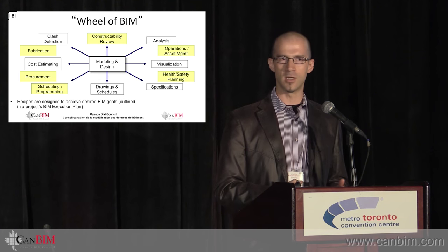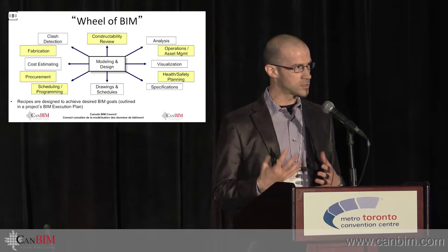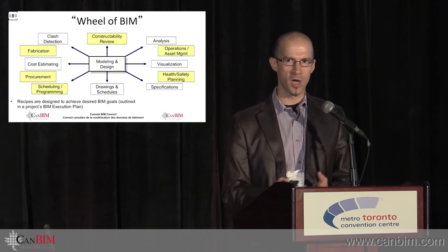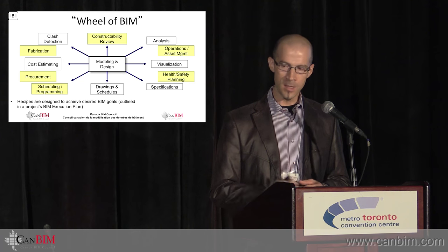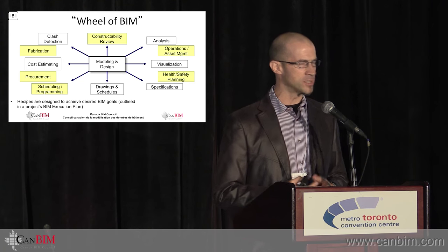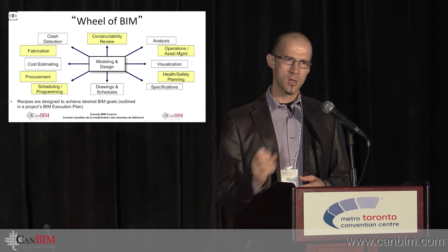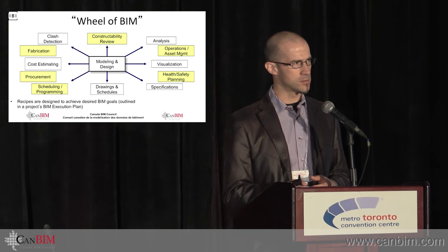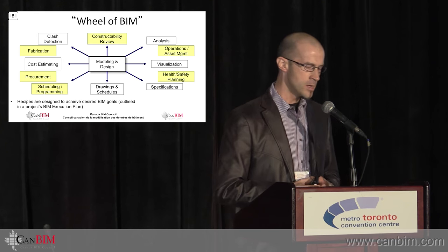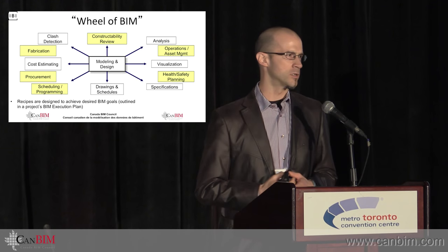So one visualization is a couple seconds. The other one could be a couple weeks. So it's planning and scoping the goal. How do we intend to do it? What's the purpose for the audience and the delivery? I spent quite a bit of time looking at specifications in the last couple of years, and that's that ability to query the model, look for specific element classes, and then feed some type of a project specification system. So Bentley has a tool called SpecWave. Revit links to a tool called eSpecs.